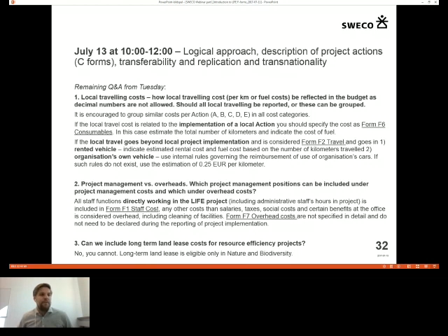Otherwise, there was also a question regarding performance indicators, basically where to include the different performance indicators. You should only include a performance indicator that is limited to the context covered by the project and nothing beyond that. And with regards to replication, there is one field in the performance indicators table, which is called economic performance, market uptake, and replication. Under that, you can specify how many replications and transfers of your technology or methodology you're expecting during the project, and then 3 or 5 years after the project.